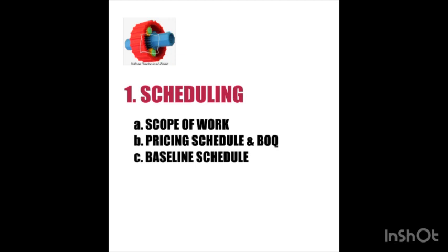Preparation of the baseline schedule is also very important. You have to prepare this schedule with all the resources and get approval from the internal management. Then, when your internal management approves your schedule, you can submit it to the client for their approval, and for this you have to follow up continuously to get the approval.